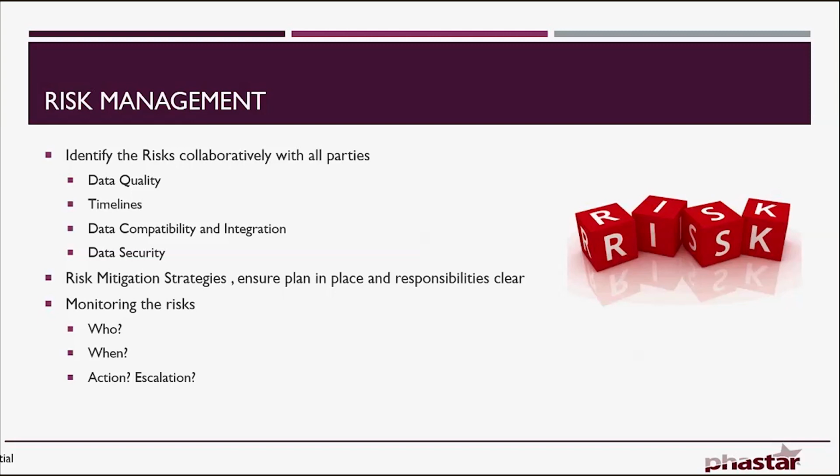And finally, really from a risk management point of view, just a reminder that during the course of a study, especially a longer term study, define who's going to monitor those risks. How frequently are you going to look back at your risk register? And what are you going to do if a risk has occurred or an issue has occurred? When are you going to put that action plan in place and how are you going to escalate and communicate?